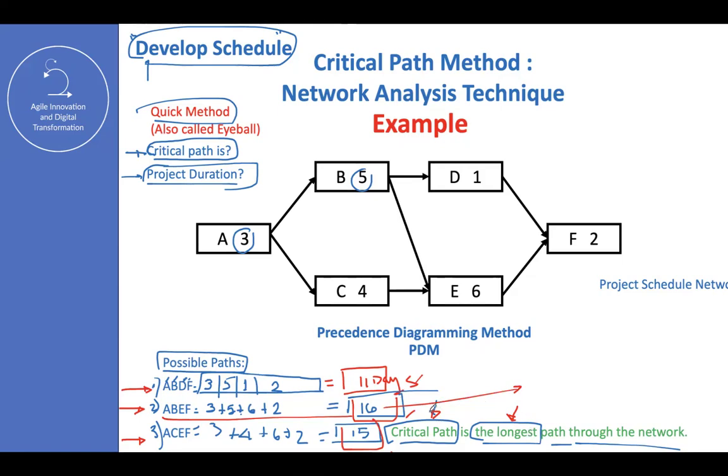Josh. Now that I know that the critical path duration is 16 days, this is the project duration. Using what? The longest path through the network. That's it. It's not tricky. It is what it is. It's no more than that. After a couple of exercises, you understand that the only thing you need to know is how many days the longest path is.